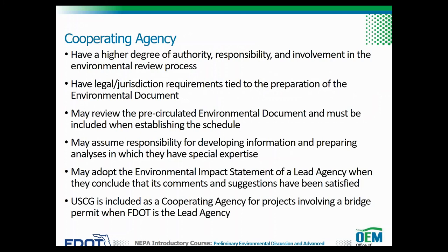What are the responsibilities of a cooperating agency? Cooperating agencies have a higher degree of authority, responsibility, and involvement in the environmental review process than participating agencies. They have legal and/or jurisdictional requirements tied to the preparation of the environmental document. They may, on a case-by-case basis, review the pre-circulated environmental document as determined by the lead agency and must be included when establishing the schedule.